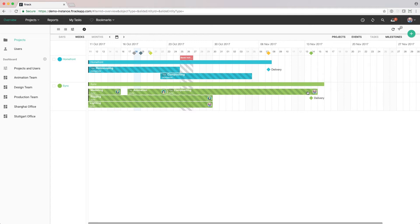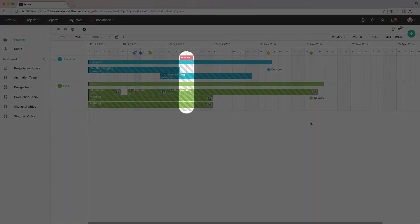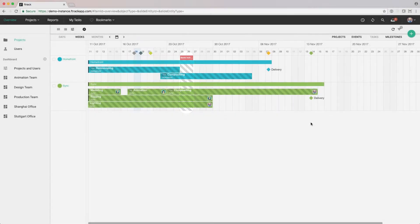We can also see a zone here that stretches across all projects. This represents a leave event where all users are unavailable for work.